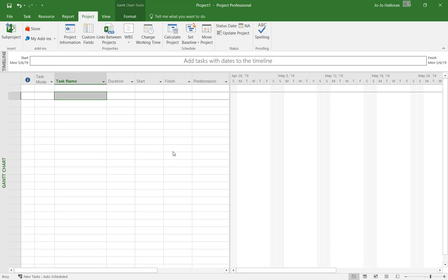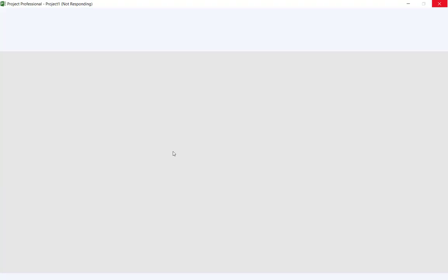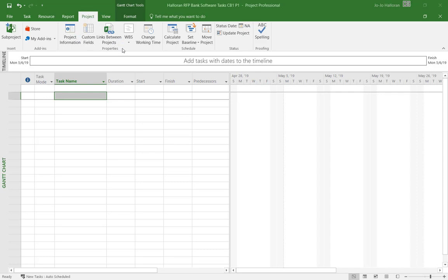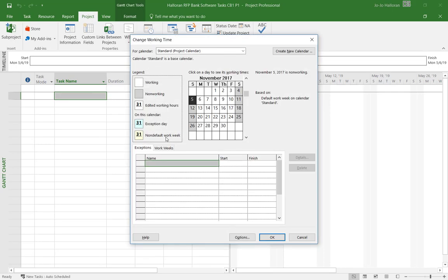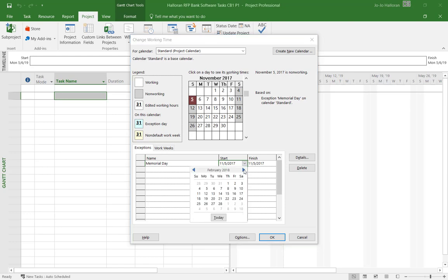Okay, so now the next step we're going to do is on the ribbon in the Properties group. We're going to go to the Properties group here, and we are going to click on Change Working Time. Okay, and we are going to add into there the following exception dates. So the first exception day is going to be Memorial Day on May 27th, 2019. So we're going to just call that Memorial Day, and that is going to start. Make sure that you're getting into the 2019 year by clicking on the little forward arrow.